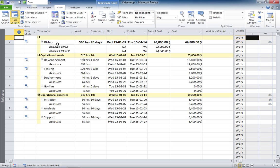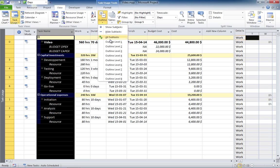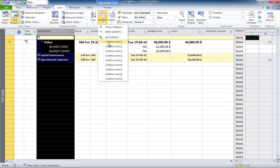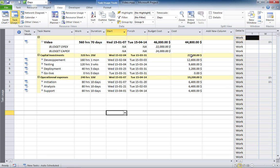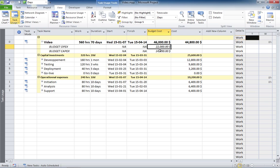Now, you see things are being grouped a bit. Now, we're going to declutter this with the outline function. There you go. Now, you can see your CAPEX value here. You can see your OPEX value here. You can compare those two values against your two budgets here. And you can see your overall plan cost with respect to your overall budget cost.